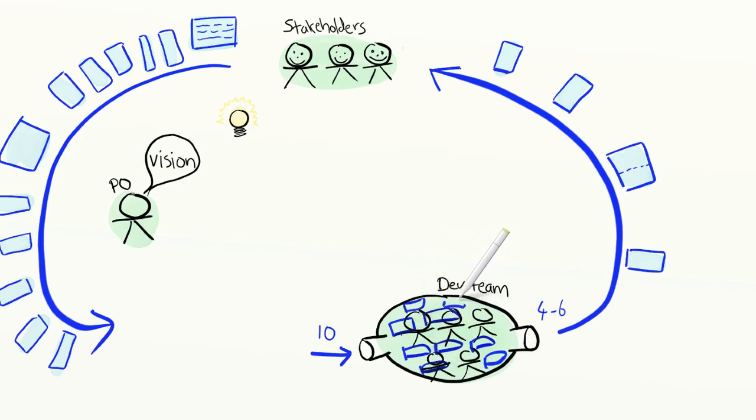It's a lose-lose proposition. It's kind of like trying to shove more paper into a printer to make it print faster, or shoving more cars onto an already crammed highway system. It just doesn't work, it just makes things worse. So what do we do about this? Well, the Scrum and XP way of avoiding this problem is called yesterday's weather. The team says, well, the past few weeks, we've finished 4 to 6 features per week. So which 4 to 6 features shall we build this week? And the product owner's job is to figure out of all possible stories in the whole universe, which 4 to 6 stories shall we deliver next?